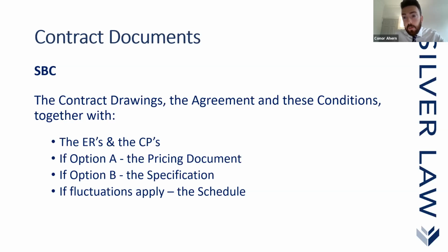What happens beyond that, if the contract goes beyond the original completion date, just depends on the operative clauses within the contract. Obviously, in such circumstances, you'll be looking at delays, and ultimately you've got to get to the bottom of who is responsible for the delays and whether such delays will qualify as a relevant event and a relevant matter, in order to try and recover any additional time and money associated with those.